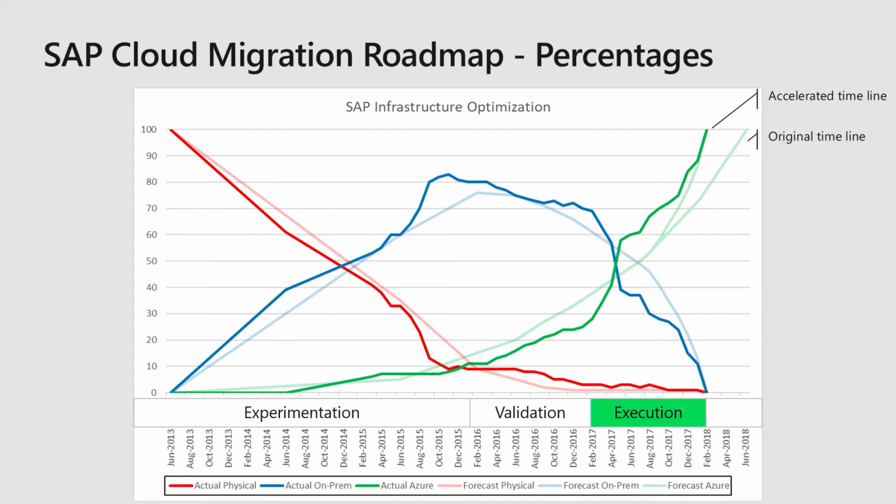So in February 2016, we had moved a few sandboxes and we said, hey, if we really want to do this right, let's automate this. Let's write PowerShell scripts, take a backup, restore it to the cloud, allocate the Azure instances, do the failover. This is all scriptable. And so you see that migration rate is now starting to tick up. And then in February 2017, we said, hey, migration is working really well. Those scripts are tested and super solid. Let's just go full out. Now we have a year-end freeze here. That's why there's a slowdown. But you see suddenly it's just full speed ahead.